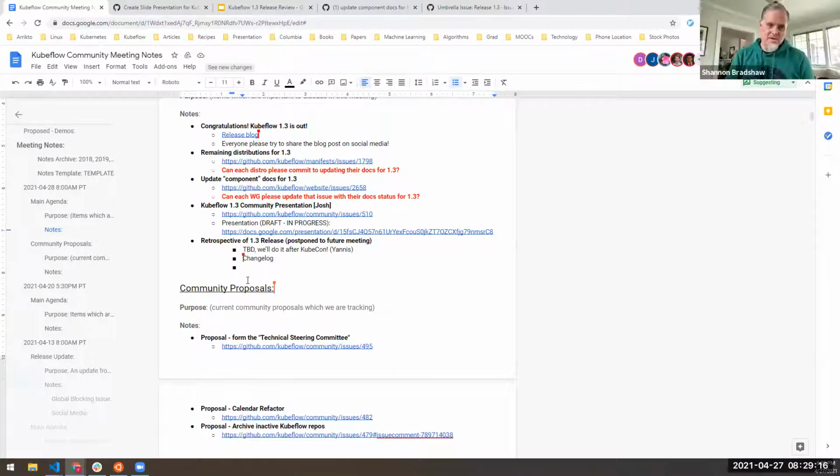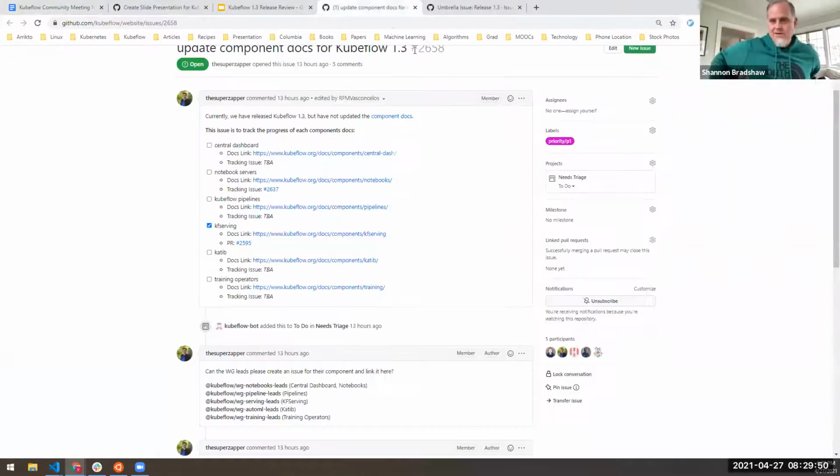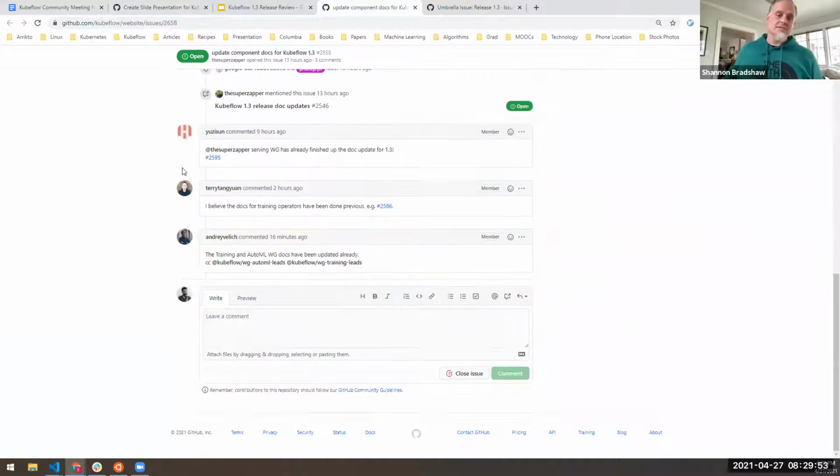Maybe that's one thing we could do that I've seen work in the past: as work is being planned, essentially on the issue itself where you're documenting the work to do, you tag it as docs needed or not, so you're thinking about it at that time. So part of the design process is actually evaluating what the current documentation says, or just because you understand the project, that this is going to be a change in software that's going to require a change in documentation, and you just label that issue that way. So we know from the very beginning the scope of work that's going to be required for docs.